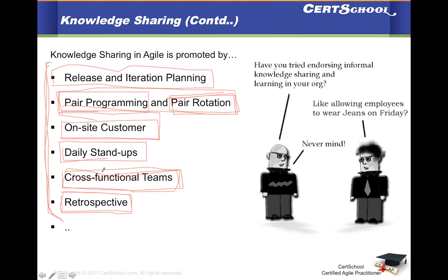Same thing goes for estimation. As a part of sprint planning, you have to do estimation as well, which is also a collaborative exercise in Agile. So with multiple people doing estimation, your estimates are getting reviewed, and they are relative in the process. If there are any doubts, you're talking to the product owner, you're driving more clarity. Wherever you're driving more clarity, you're becoming smarter, gaining knowledge.